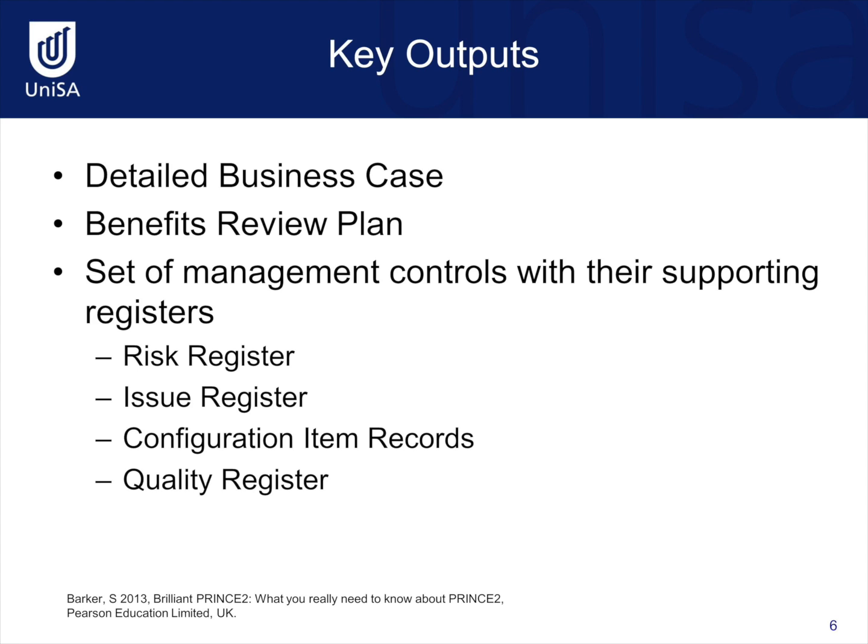As part of setting up a project, there needs to be some sort of controls and supporting registers. How do we manage risk? How do we manage issues? How do we manage configuration items? How do we manage quality? They are managed by setting up registers, and a register could be a simple Excel spreadsheet containing the relevant information.